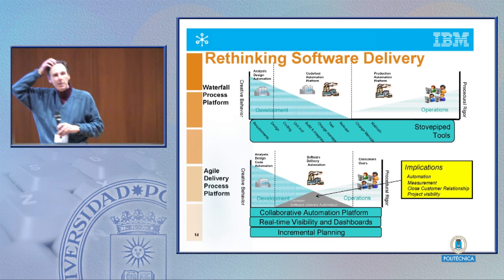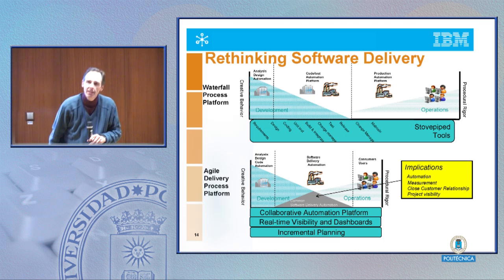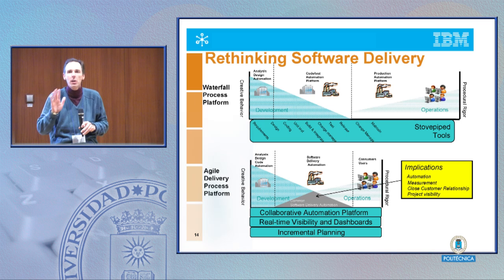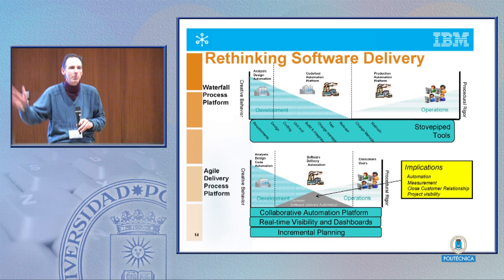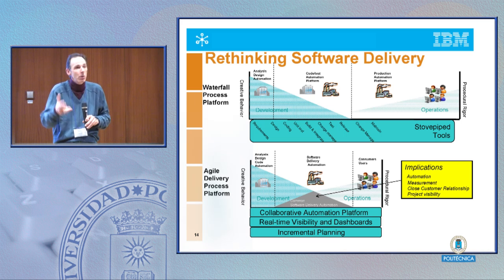So there's a joke that we have in IBM in some of our projects that said, if we delivered the null project, we actually didn't write any code, but followed all the steps, it would still be 6 months. And we haven't delivered anything to go through the reviews, the sign-offs, we have certificates of originality, we have 100 things. Even if there was no code, it would still take 6 months. But the deadline's 3 months. So how are we going to deal with that?